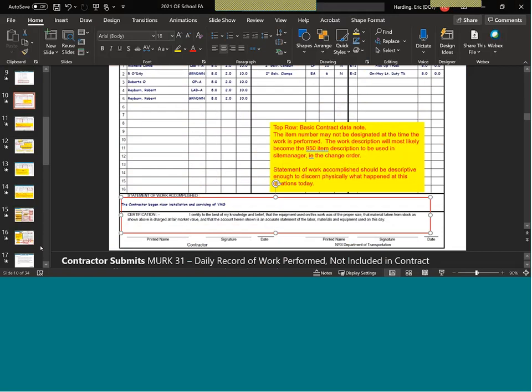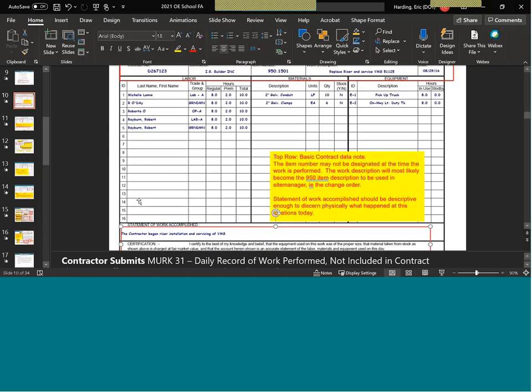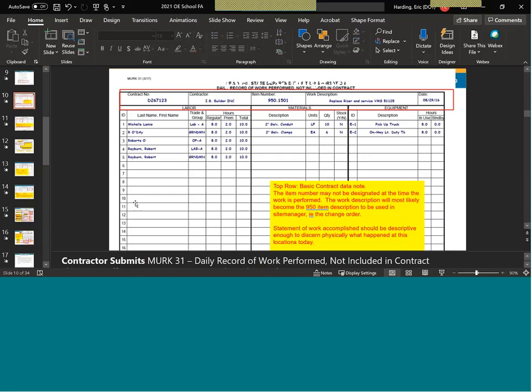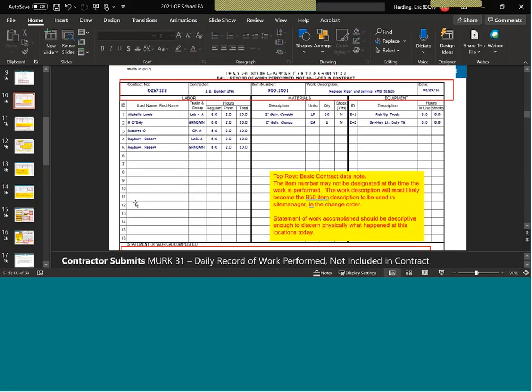Do Eric or Mike have anything they want to add or any questions? Yeah, I would say obstructed drilling would be a good example of that. If you've got production and you're drilling for micro piles or whatever, it can be hard to know what's extra work and what's production. To a certain depth, you're paying under structure excavation too, so that could be an example.